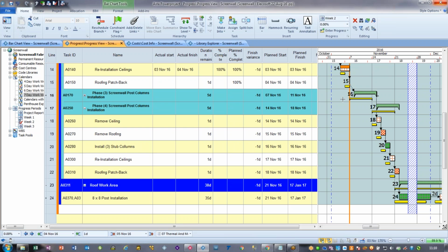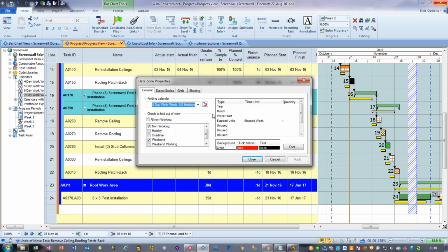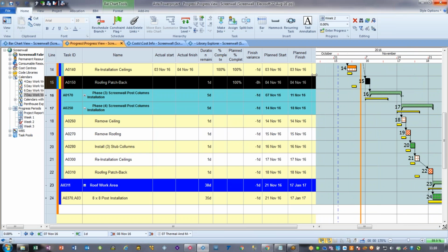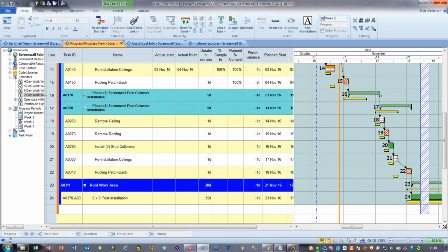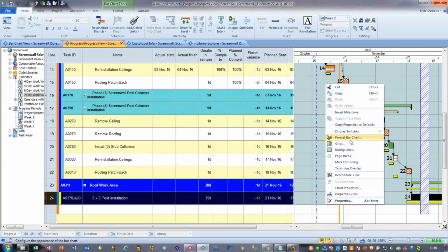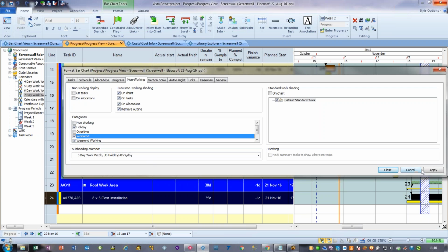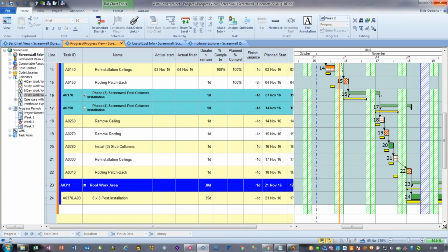But you see, as I move it backwards in time, it disappears because in this view, and this is a complication perhaps we don't need, we've been folding weekends out. So really, if I go back to this view, what I should perhaps also display is we also show the weekends. So on screen, I've got green lines. Yeah. And that illustrates the weekends, correct? The green. Yeah, so this task, because I've given it a set calendar, this can now happen inside the weekend.